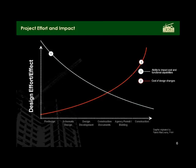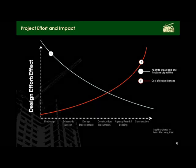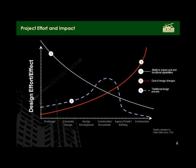The basis of this process is what has been tagged the MacLeamy curve. The idea is that as a project progresses, the ability to impact cost and capabilities drops off and the cost of making changes rises dramatically. The traditional process has most of the work done during the construction documents phase — right where the ability to impact cost and function has dropped way off and costs are starting to go way up.